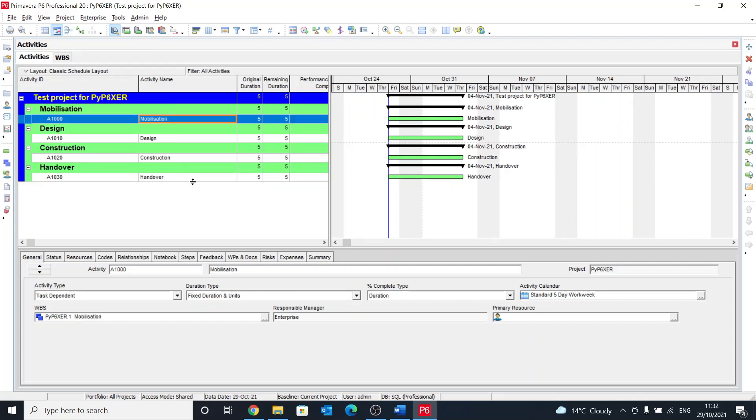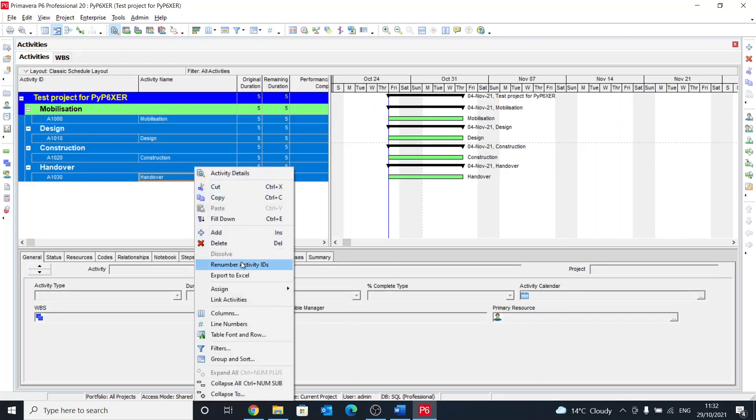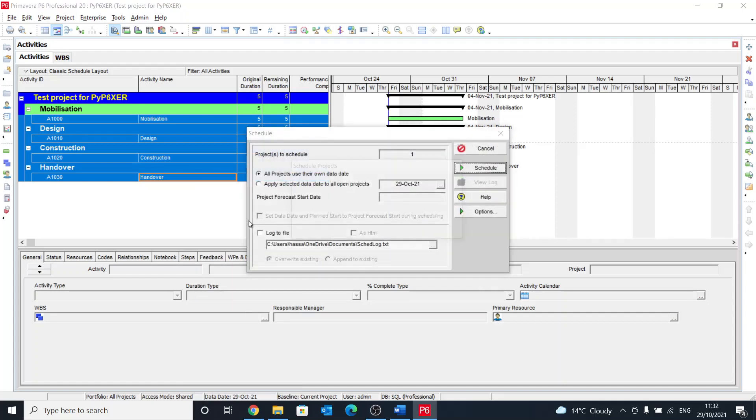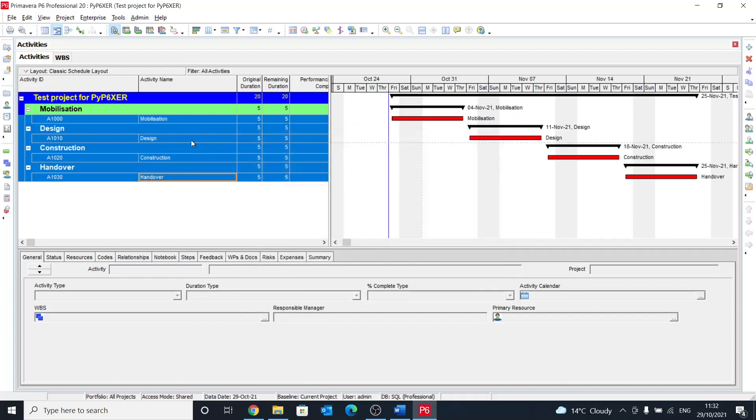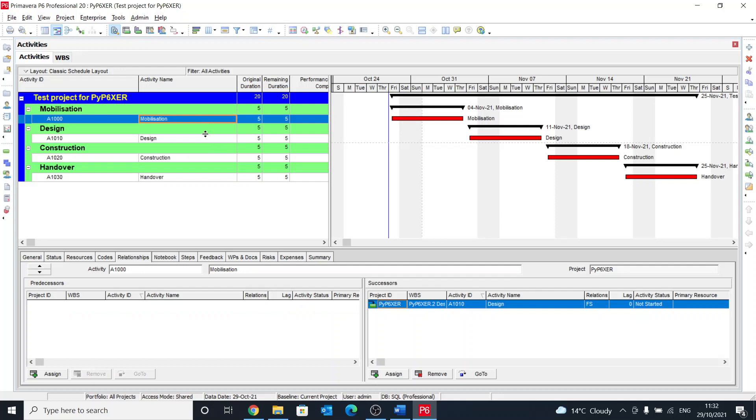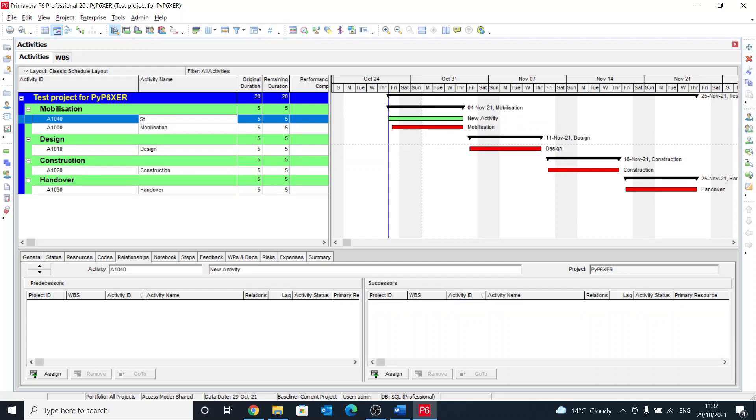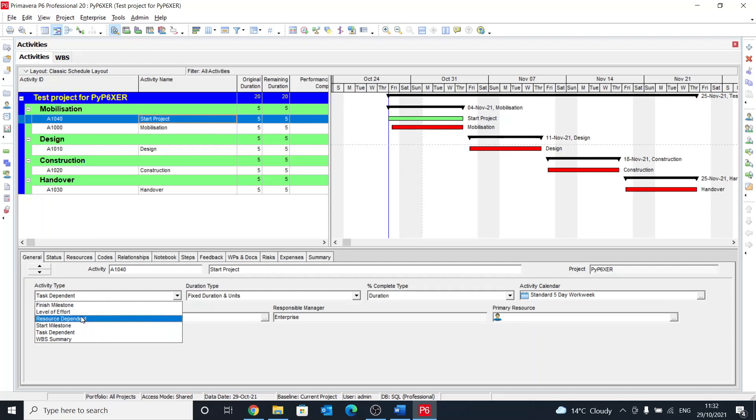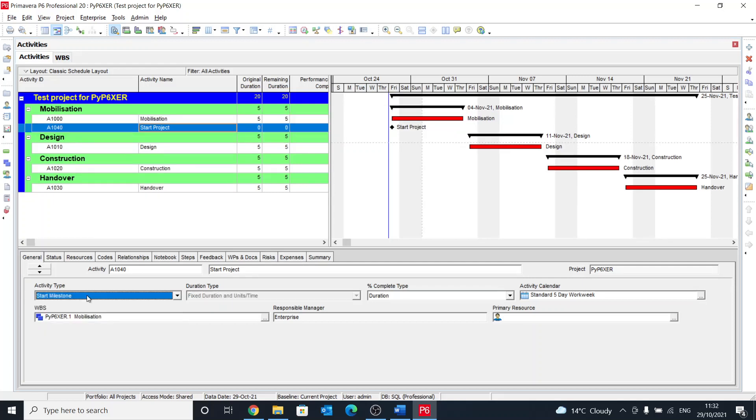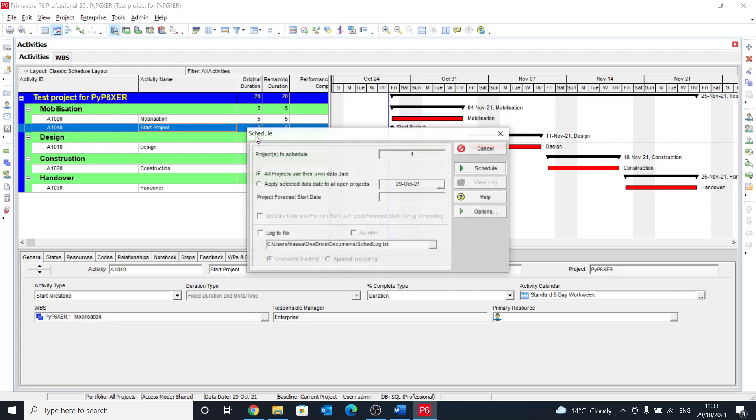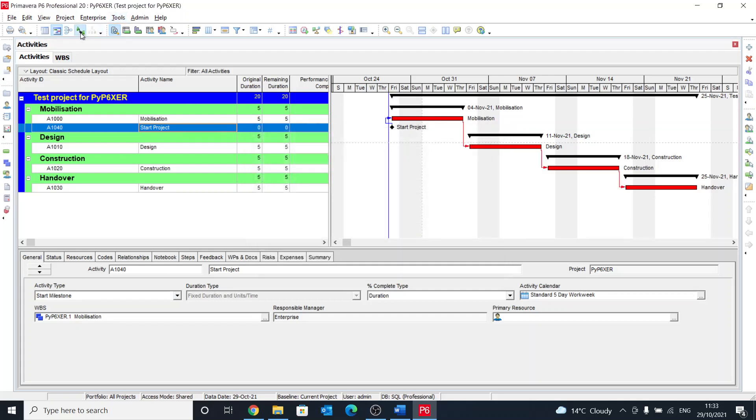I'm going to link them all, finished activities to start with, and reschedule this. We have now all finish-to-start, but I'm going to change them so we can see different items in the project. So let me first add here start milestone, and then make this as a milestone. Start milestone. And then I would link this activity. What we can do also, you can show the links so make sure that things are proper.